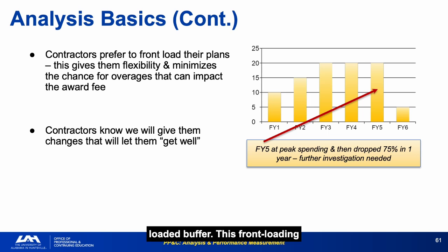This front-loading motivation is not deceptive in intent. It is a rational response to the incentive structure. But it means the plan is not a true reflection of when work will be performed. A front-loaded contractor plan is a negotiating position, not an execution forecast. Treat it accordingly.